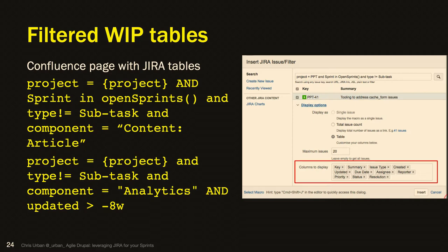As long as you have the states tracked, you can count the tickets that make it through that path, but you cannot count the number of iterations. So if a ticket went through that cycle five times, Jira will not track that. You have to customize it and put that iteration in there, saying this is UAT1, UAT2, UAT3. There are plugins you can get that will add that counting, but my argument is, what's the benefit of that? What's the difference between it being reopened once as opposed to five times? You may want to just add a comment in the ticket and use that.